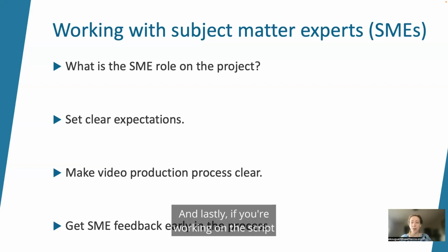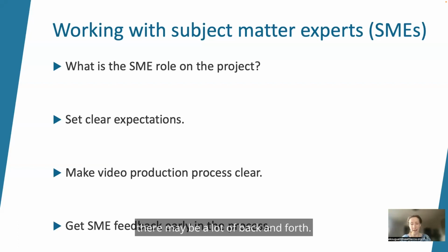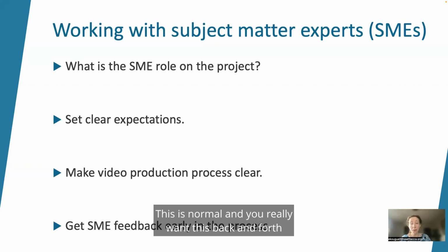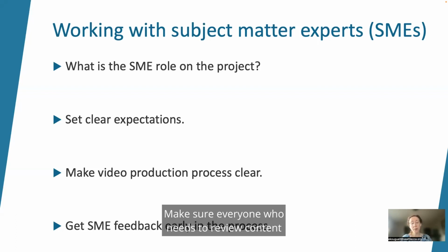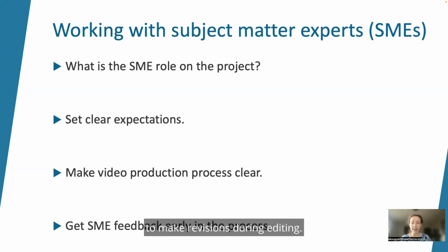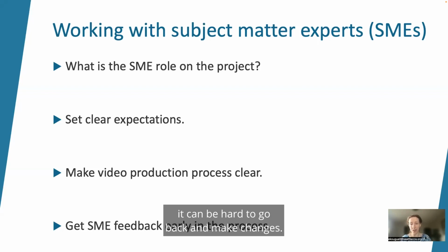And lastly, if you're working on the script or storyboard with SMEs, there may be a lot of back and forth. This is normal, and you really want this back and forth to be happening during the pre-production and scripting phase. Your goal is to basically lock the script before filming and editing. Locking the script means no more changes. Make sure everyone who needs to review content has done so during scripting or storyboarding, especially if it will be hard to make revisions during editing. Once you are editing the project, it can be hard to go back and make changes.